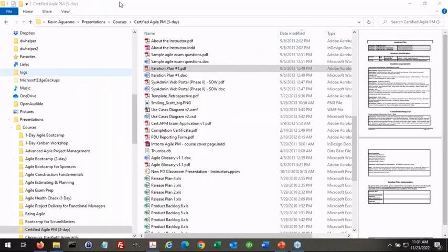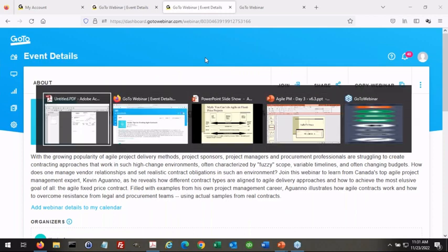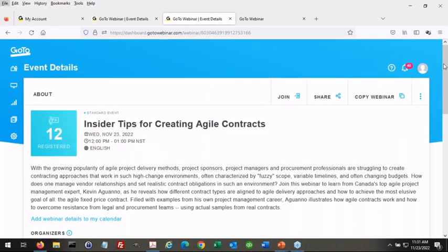The next piece you want to look at is the, oops, did I close that down prematurely? I did. Well, the next piece we want to look at is the iteration plans themselves. The iteration plan is, as I said, essentially your change request form that changes in some scope. So let me show you what an iteration plan could look like to give you a sense of what actually is coming into scope as part of this project. Remember that these are like work orders, right? You're signing these to authorize work to come in. So let me open one up.